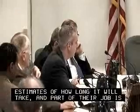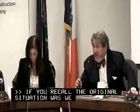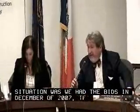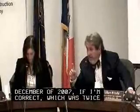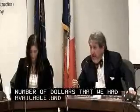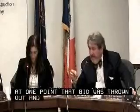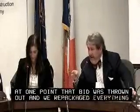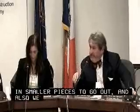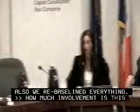I'm asking a question. If you recall, the original situation was that we had a bid in December of 2007, if I'm correct, that was twice the number of dollars that we had available, and there was only one bidder. At that point, I think that bid was thrown out, and we repackaged everything in smaller pieces to go out, and therefore we also rebaselined everything and resequenced the job. How much involvement is this consultant, construction manager? Maybe just if they're not involved at all, that's fine.